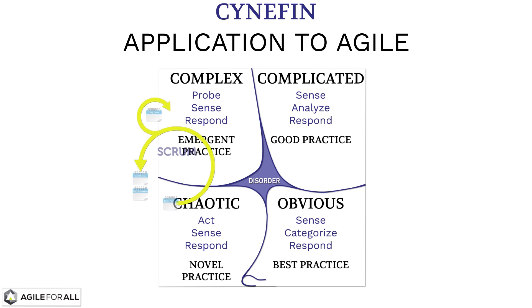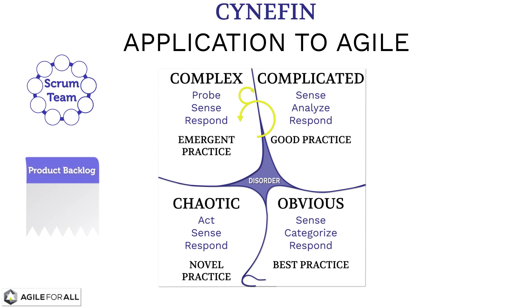Scrum treats the product development problem as if it is complex. We get a cross-functional group together. We add constraints to the system by prioritizing and thinly slicing the most important work to do first. This constrained amount of work is developed during a safe-to-fail experiment called a sprint. We execute the sprint as if it may be complicated work, doing expert analysis through product backlog refinement and sprint planning to create the plan. We then oscillate between the complicated and complex domains during the sprint, planning the next day's work and then sensing whether the plan still makes sense during the daily scrum meeting, changing the plan as appropriate.